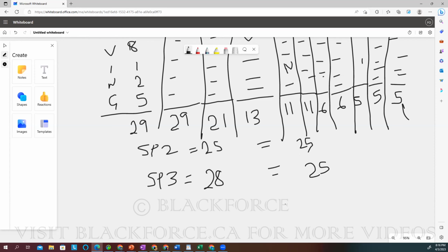At that point in time, during sprint 1, sprint 2, sprint 3, the team is still doing trials, right? They are still trying to understand what their velocity is as a team. During the first one, it was an initial velocity. They took in a 29. They based it on the fact that they can do two story points, right? And at the end of the day, they finished 24. Now, based on this, on sprint 2, they took in 25, which is so close to what they finished the other time, 24. They are saying that, okay, because a lot of issues happened on that one, we should have finished it. But because of that, we won't go above what we did before more, but we just take a bit more.